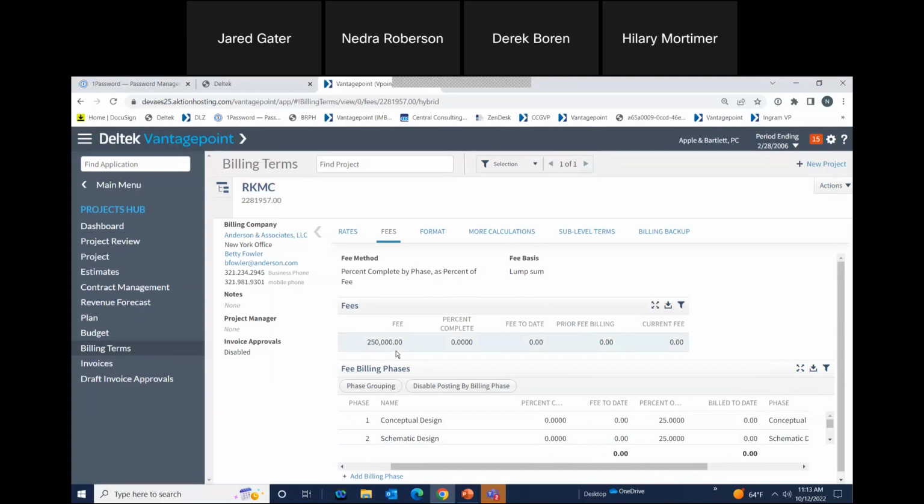Now that does include my amounts for the direct expense and direct consultant, because we are going to invoice that, even though we're not going to invoice it like we did on the hourly invoices, so that it does show up here, but it doesn't show up on time and materials jobs in the limits.